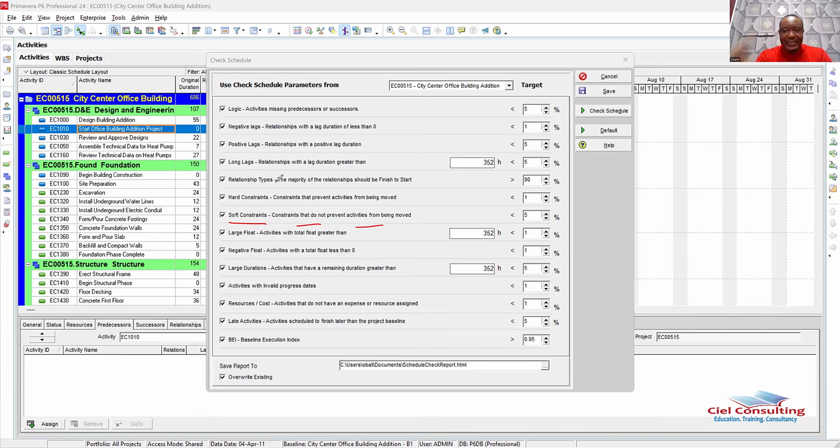Notice that when you're creating your schedule and you have, for example, activity A, and activity A will take 5 days, then if activity B is dependent on A, you have a link here between activity A and B. So this is activity B, and let's say activity B will last for 4 days. So you can see this is the natural flow of things. It means that B is going to start on this date when A has finished. That's the natural way it flows. So whenever you're creating a relationship, that's how it should flow. That's why when we talk about natural flow, we're basically saying that it should flow in that particular order.